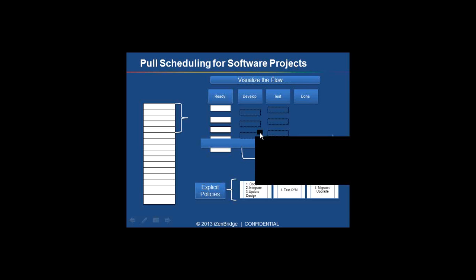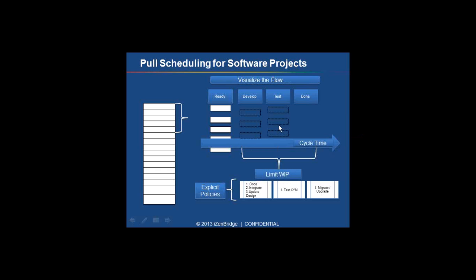But in this example I am taking a case where we have a product backlog, a list of requirements which we need to produce in a given duration, maybe in a given iteration. The first thing we can do, the way I explained in the photograph before, is a planning meeting where team members, a project manager and business people come together and identify which set of features they want to develop in the next iteration. For simplicity, think of it as our monthly planning. On day 1, we identify which things from our backlog we should finish in a given month. So that's the first thing.